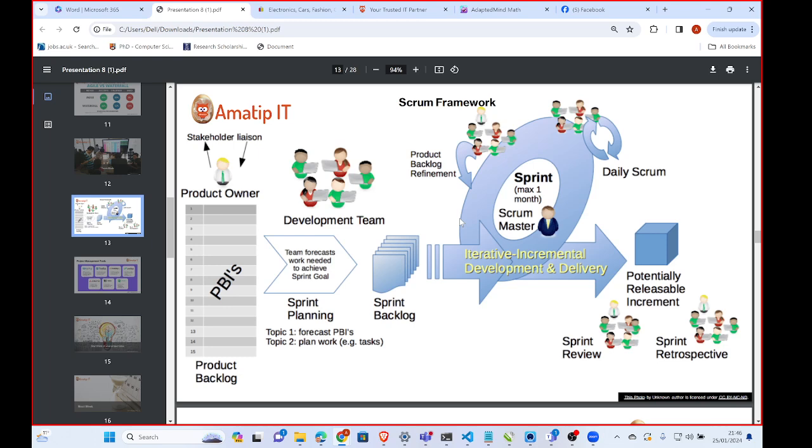So basically, the Scrum Master is coordinating the entire project operation and monitoring the project progress in order to ensure that you do not deliver your project late. For instance, if the project is supposed to be delivered by March and you have 3 sprints for that product, and by February you have not even finished the first sprint, definitely everybody will know that there's a problem.